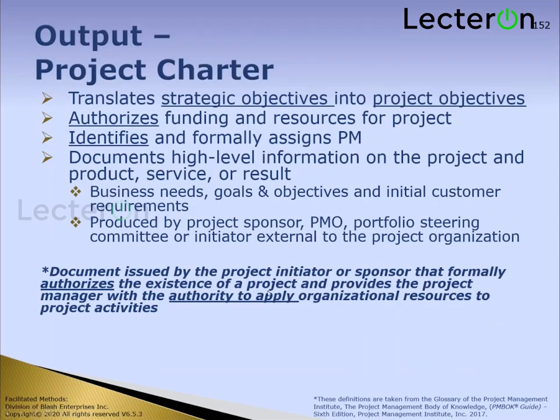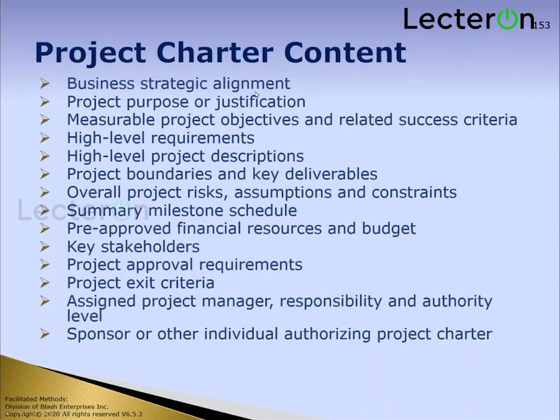The output from this is your project charter. Once again, authorizing, identifying the project manager, maybe some high-level information. Usually the project charter is a one-page document. Bullets, not a whole lot of words. The longer you take to write this, the closer it gets to become a scope statement, not a charter. So it could have how you're aligned, why you're doing this, bullets.